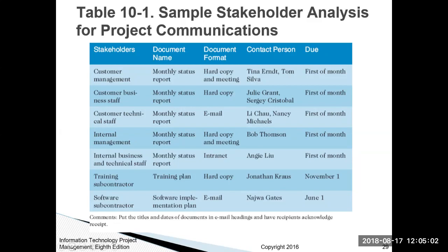And then you have your due date, and so this gives an actual image of who's responsible for what, their method of contacting everyone on the team, how often they're going to be contacting everyone on the team throughout the project, and when you can expect to get their report, so that you know that everyone is progressing on time. So if somebody is not reporting, in this example, on the 1st of the month, and it's the 2nd of the month and there's no report, everybody knows they can go back to that person and say, hey, where's your report? We can't move forward because there is no report.